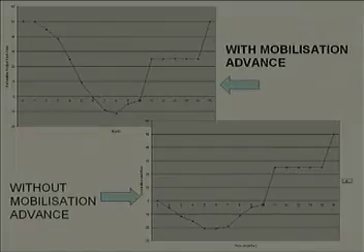Whereas, if you have not received the mobilization advance, for almost the entire project duration you are in a situation in which you have to invest your own money. If you have money available with you, you can invest it on your own. If you do not have money with you, then you have to borrow it. In both cases, you have to lose certain interest.